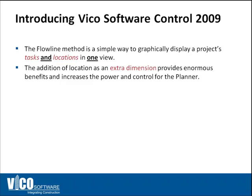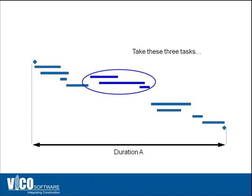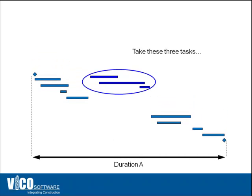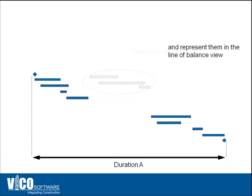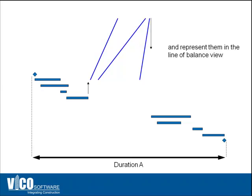When you look at a Gantt chart schedule and just take these three activities and transform them into a flowline, you can see that the task in the middle has a lower productivity and a slower utilization of locations than the two activities at the beginning and the end.